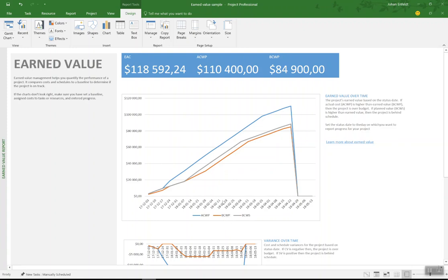and we see here that in this case the earned value is a bit lower than the plan value, and this means that we are a bit behind schedule. If we look at the horizontal line at 40,000 here, we see that we hit 40,000 according to plan here, but we are roughly 2 or 3 weeks later to hit that value according to the performance of the project. So we see here that we are behind schedule.